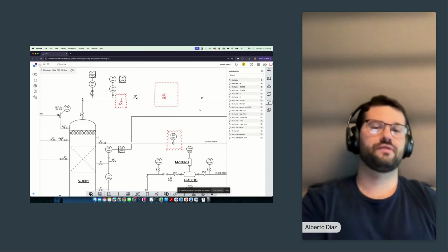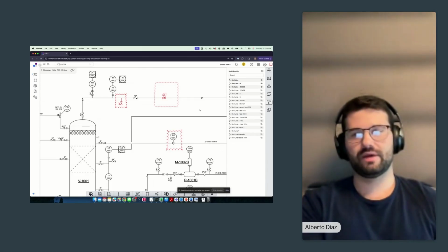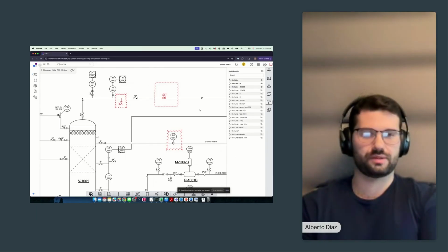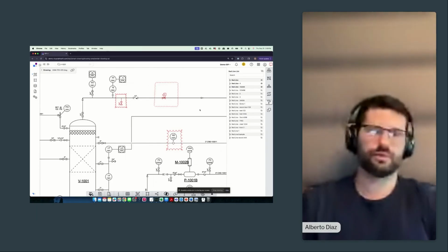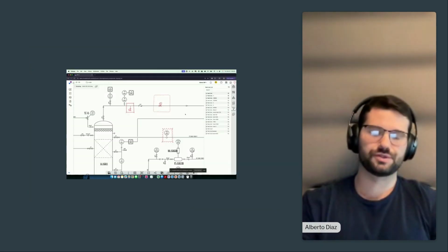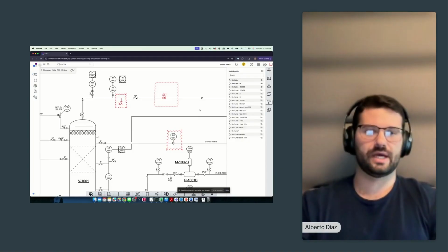The red lines were in fact traced or taken into account manually or on PDFs. And at the end of the chain, it might get lost as part of that process in some stick file somewhere with a stack of other PNIDs that were never introduced into the management of change process for the actual master CAD files.